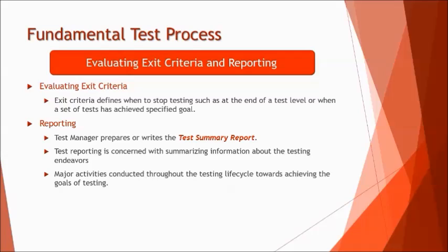We mention there the overall summarization of what major activities you have done, how many test cases you have executed, how many defects you found, what the fixation rate was, what risks you identified and how many risks you could mitigate. It is all oriented towards showcasing that we have met the goal, we have met the objective, by conducting all these steps. So the test summary report is all about this, and that's where we say this is one of the last activities of our STLC model.